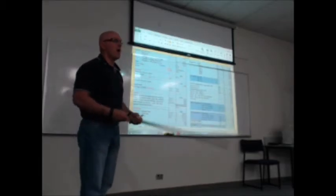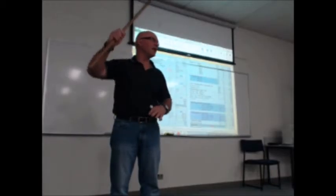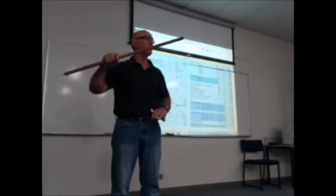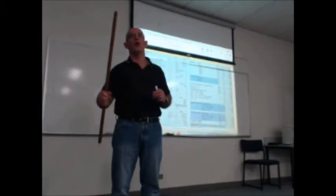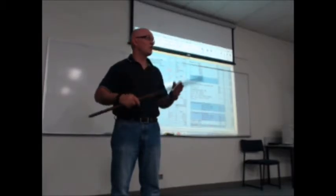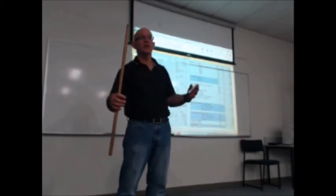As a rule of thumb, I used to work on 900 increments. So I either had a 900 be full height or 900 be half height, and I had a price for each one, depending whether it was timber or aluminium. But that's something that you get as you work and get the prices in. I can't give it any other way.